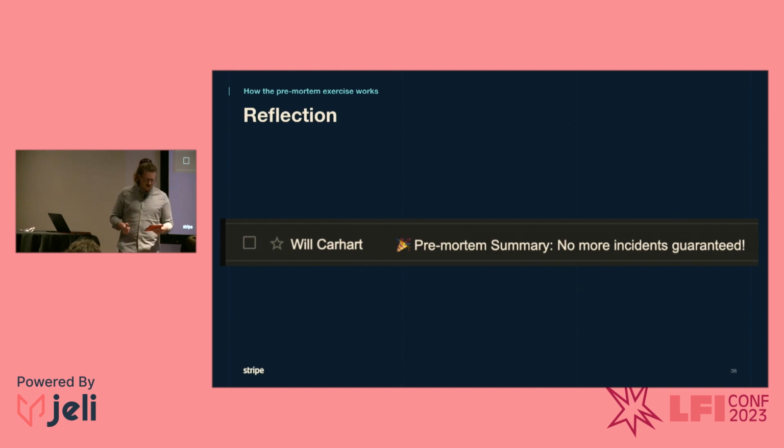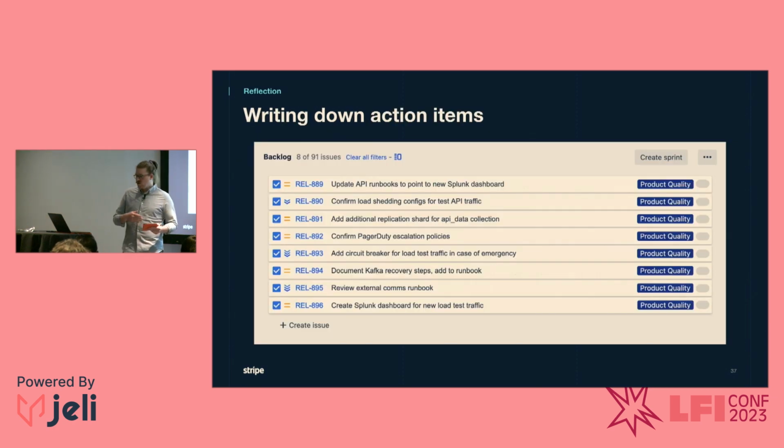The conclusion is pretty straightforward. It just is kind of how the exercise went. It makes it really easy to publish it to a mailing list or Slack. But the second part, the action items, is probably the most tangible piece of the whole exercise. You can run through the full discussion notes and notice times when anyone explicitly called out, like, this is an area for improvement, and then try and translate those sentiments into whatever tool you use for tracking work.